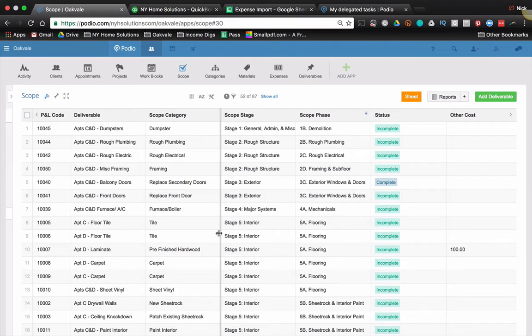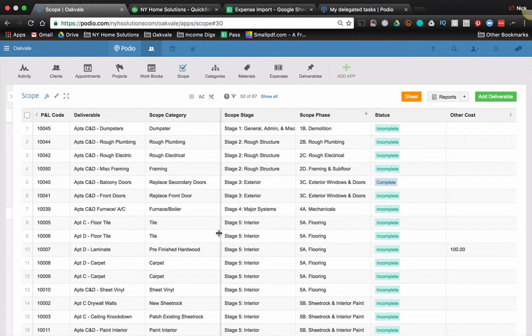So we're going to use each of those tools for what they do best. We're going to get them to talk to each other with a scheduled integration, a scheduled import. So the way that we have things set up here is I have a scope app in Podio. And basically all my scope app is, is line by line, it's all of the things I'm going to do throughout the rehab.